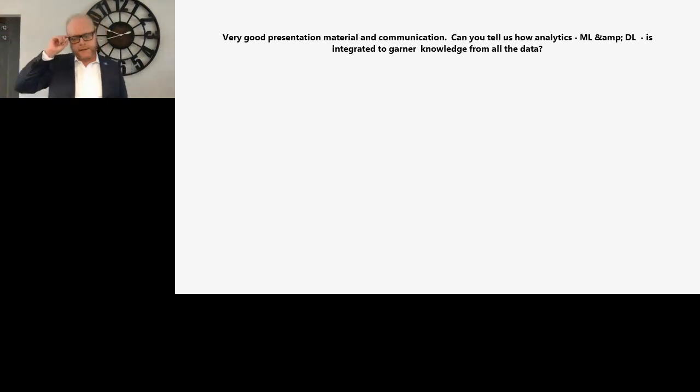So here's some analytics examples. We can now take in your CAD 2D, 3D, and 4D file. And if you're doing a laser scan or a photogrammetry scan within your facility or on an earthworks project, as an example, that very day, the very next day, we can tell you whether you are on plan or off plan and by what percent against every component, whether it's earthwork, steel, concrete, or otherwise. And you can break those down into individual pieces, or you can roll it up to a full project plan.